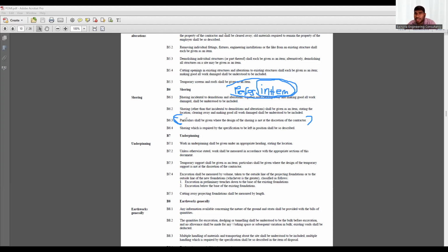Then your professional indemnity insurance will pay that money back to the client to cover the client from the loss. So this is not only the design, whatever services you deliver, you agree services with the client, then there is a defect in your services, there is a delay in the deliverables and you didn't deliver properly to your client as you agreed, then your professional indemnity will come forward and protect your client from the damage. That is professional indemnity insurance.